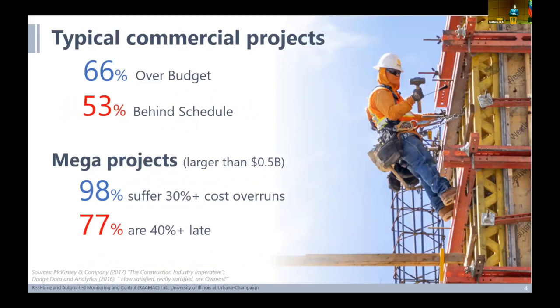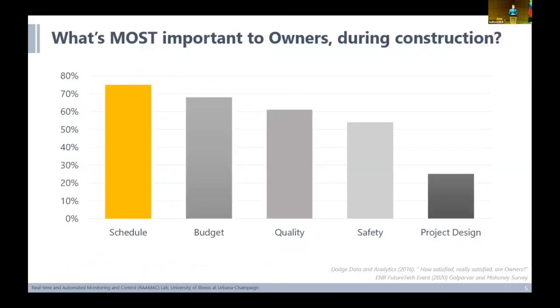But you may say, so what does that mean for those of us who are engaged in construction projects? That means when you have these coordination and communication problems, most likely your projects are finishing behind schedule or over budget. These are the numbers that Dodge have published over the past few years, that especially when it comes to mega projects where coordination matters, that number is almost 80%. So 80% of our projects still today, with everything that we've done with research, every technology we use, happen to be behind schedule. Now, we have actually done a survey.